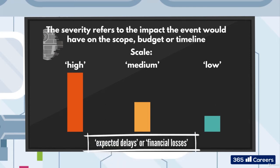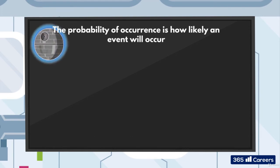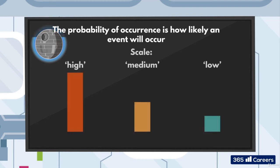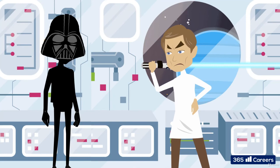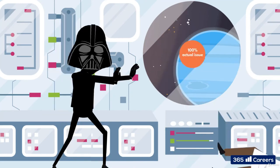The probability of occurrence is how likely an event will occur. Again, a simple scale of high, medium or low probability can be used, or depending on the project, perhaps it could be measured by percentage. Obviously, 100% would no longer make it a risk — rather something that is certain and would make it an actual issue.